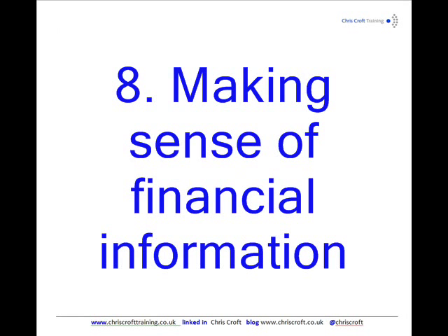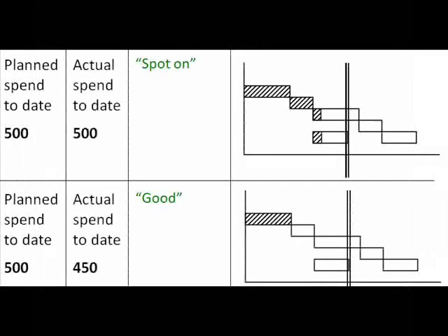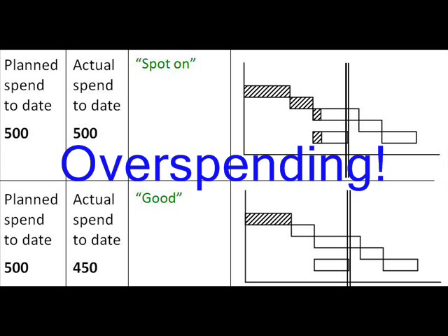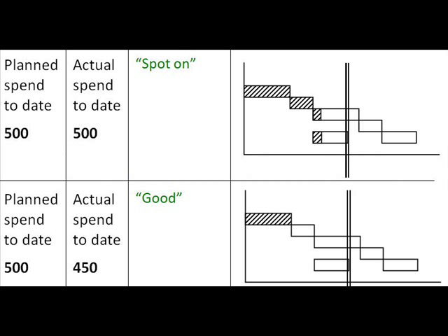Number 8, making sense of finance. Is an underspend really just lateness? By the way, underspent usually does mean late, overspent usually means overspent. And just a final thought, underspent means late, which means overspent in the end.